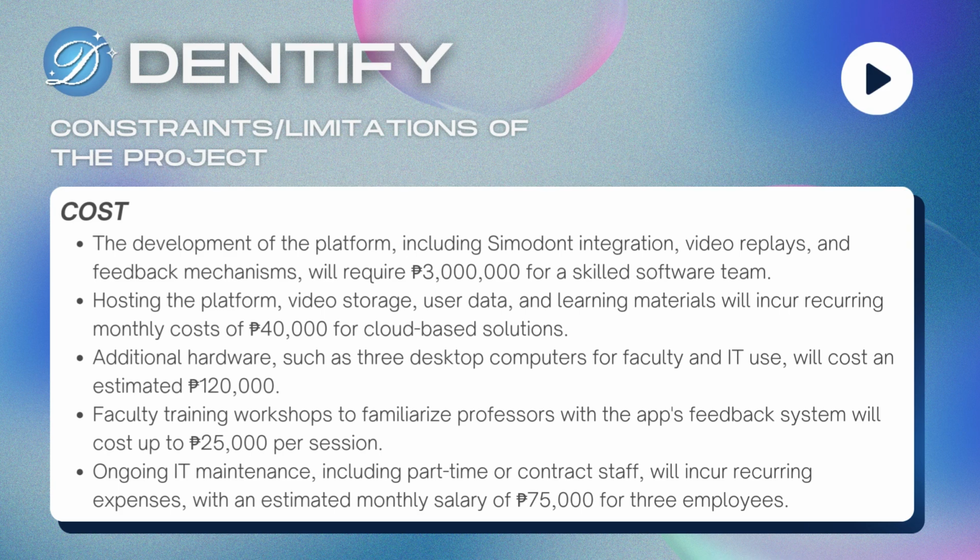Faculty training workshops and ongoing IT maintenance will add 25,000 pesos per session and 75,000 pesos per month respectively for 3 part-time employees. To manage these expenses, the project will seek funding through university support, research grants, or technology partnerships and adopt an incremental implementation approach to optimize resources.